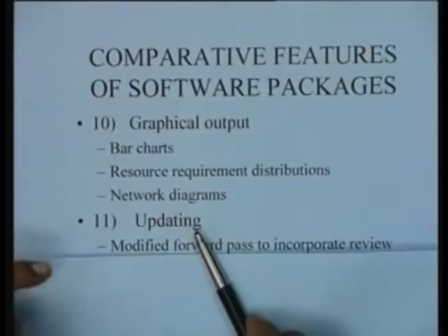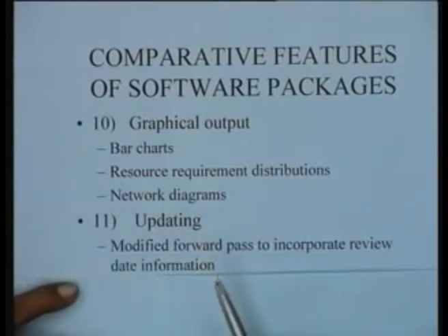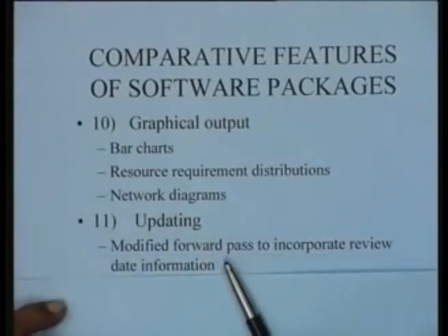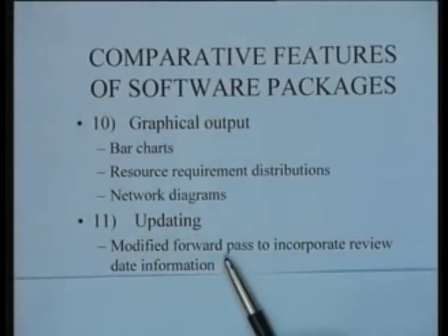So updating, what does updating really mean? I mean, in a physical sense, what it means is, if I review my project on a certain date, I have to compute what are the remaining durations for the various activities. Activities which have been accomplished, their remaining duration is 0.